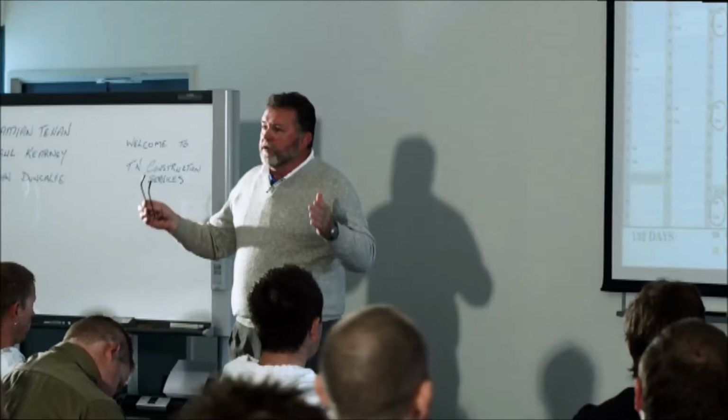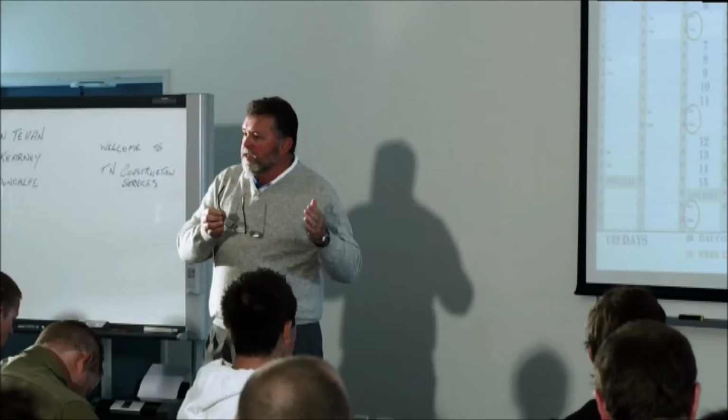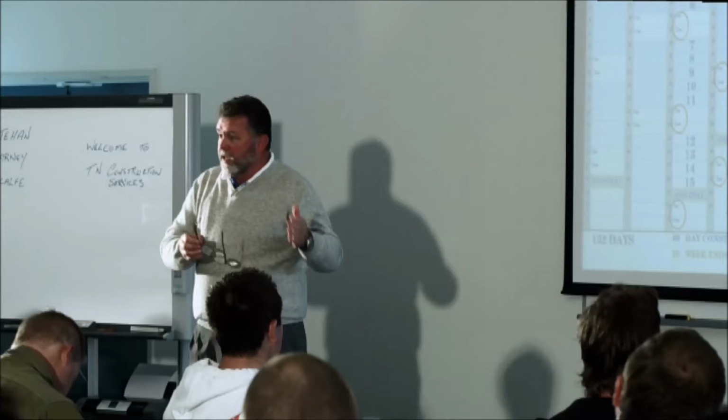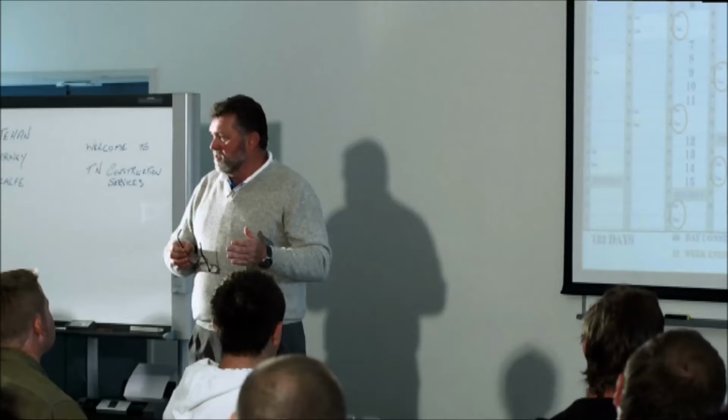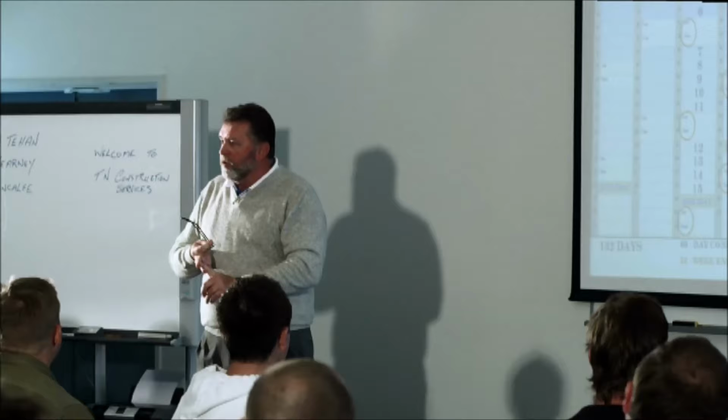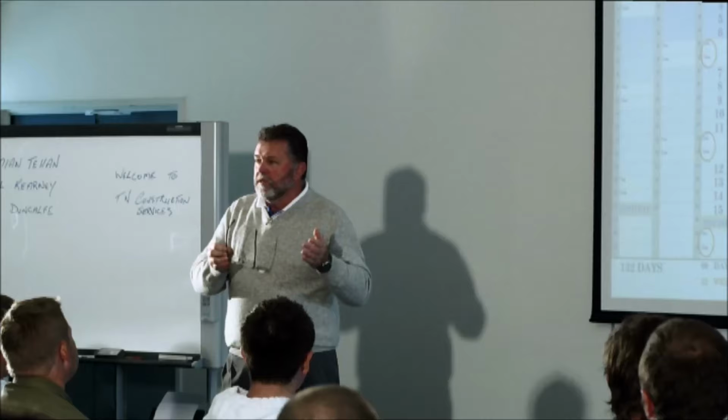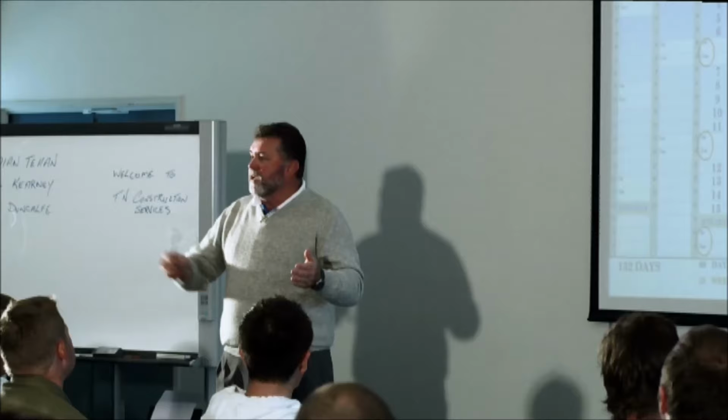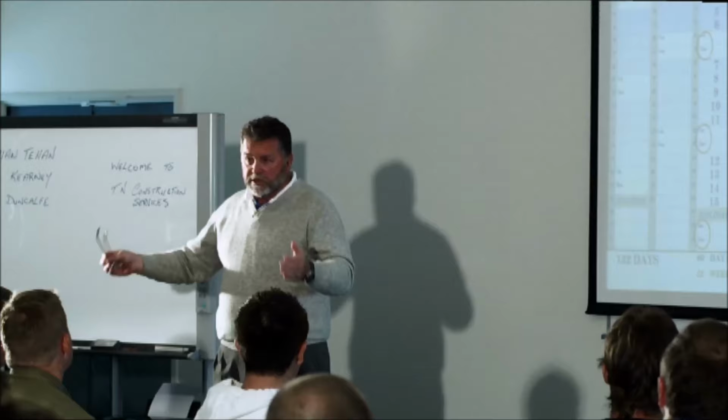Now, it is not just the construction period, that might be 16 weeks, Monday to Friday. You must make allowances for all other delays. Weekends, public holidays, if you're going across the Christmas period, the Christmas shutdown. So all of a sudden, something that might normally take you, let's just say 70 days, may go out to 235 days on your construction period. That's the construction period you've got.